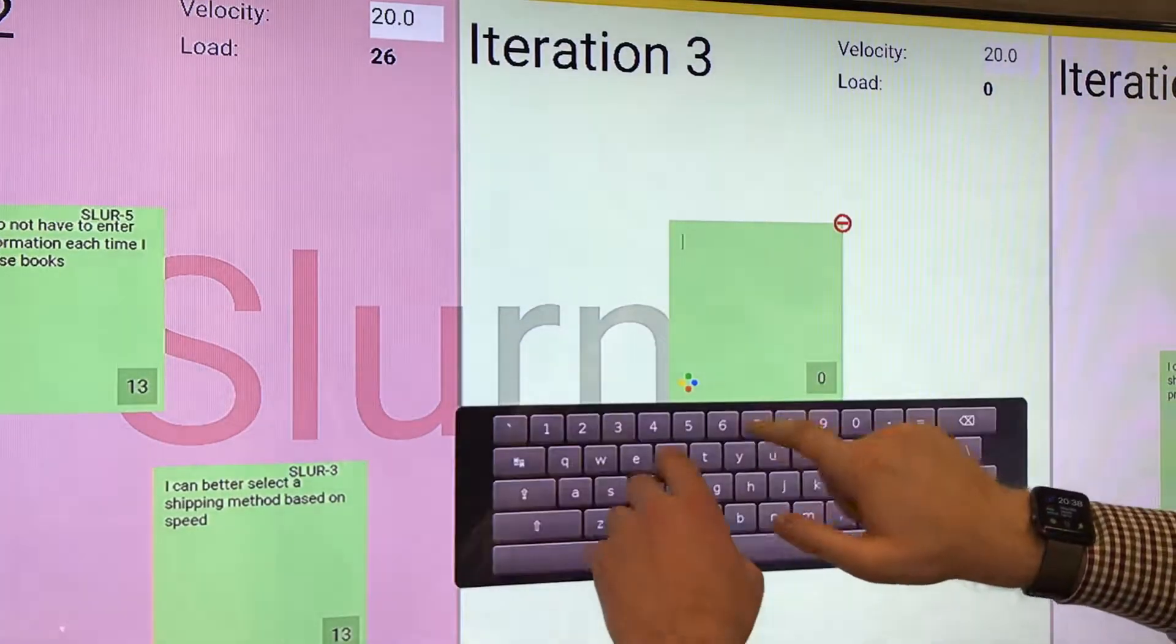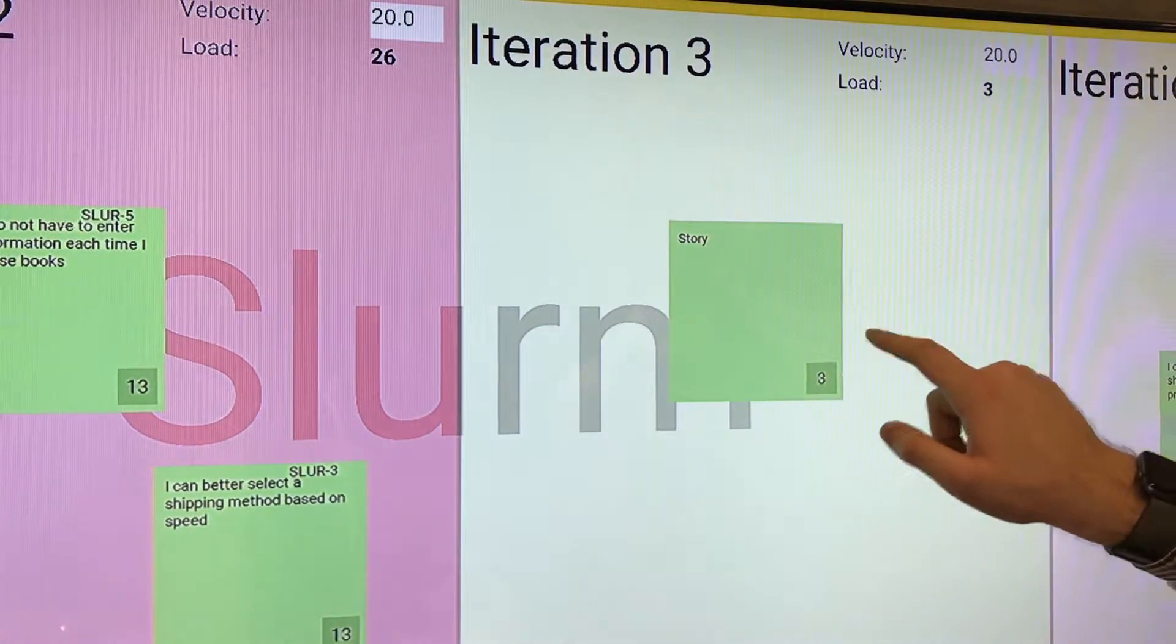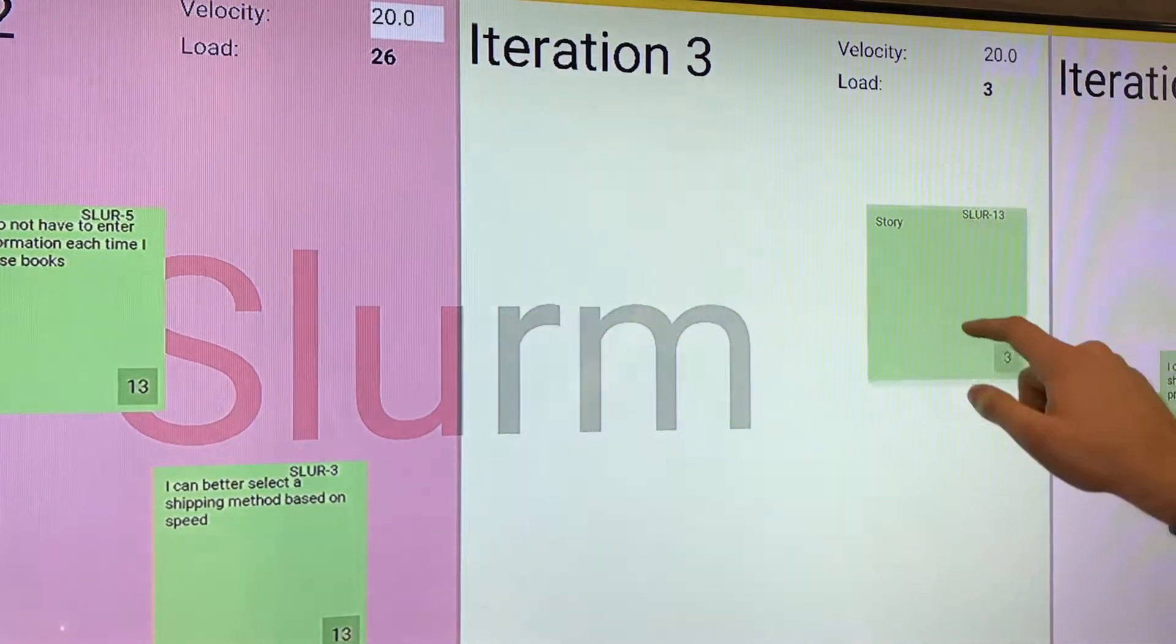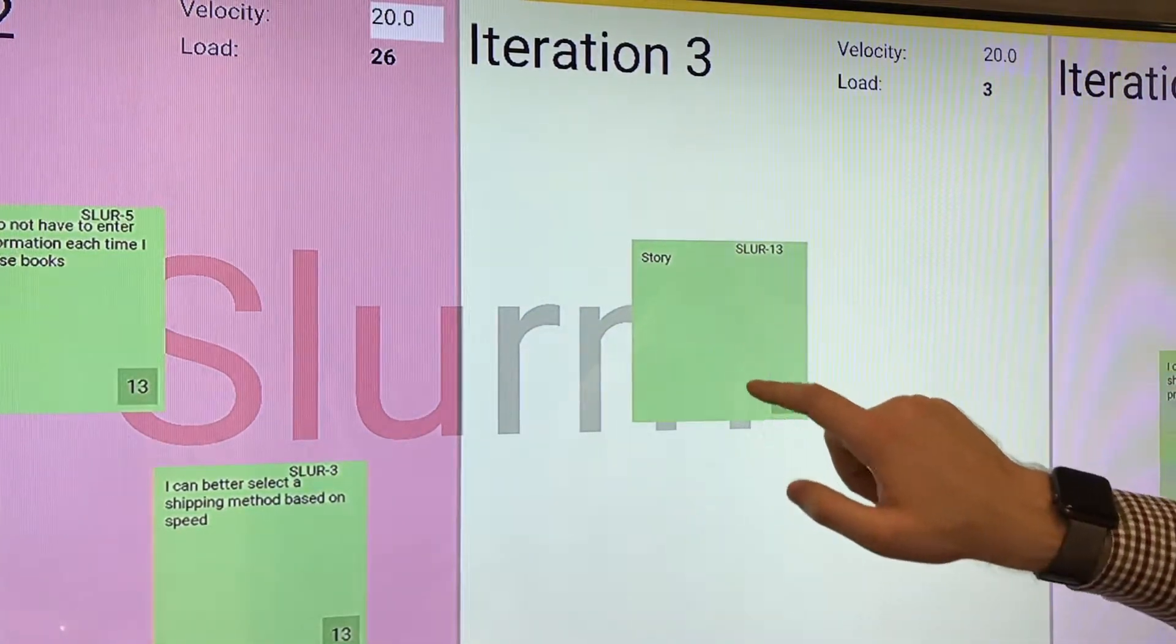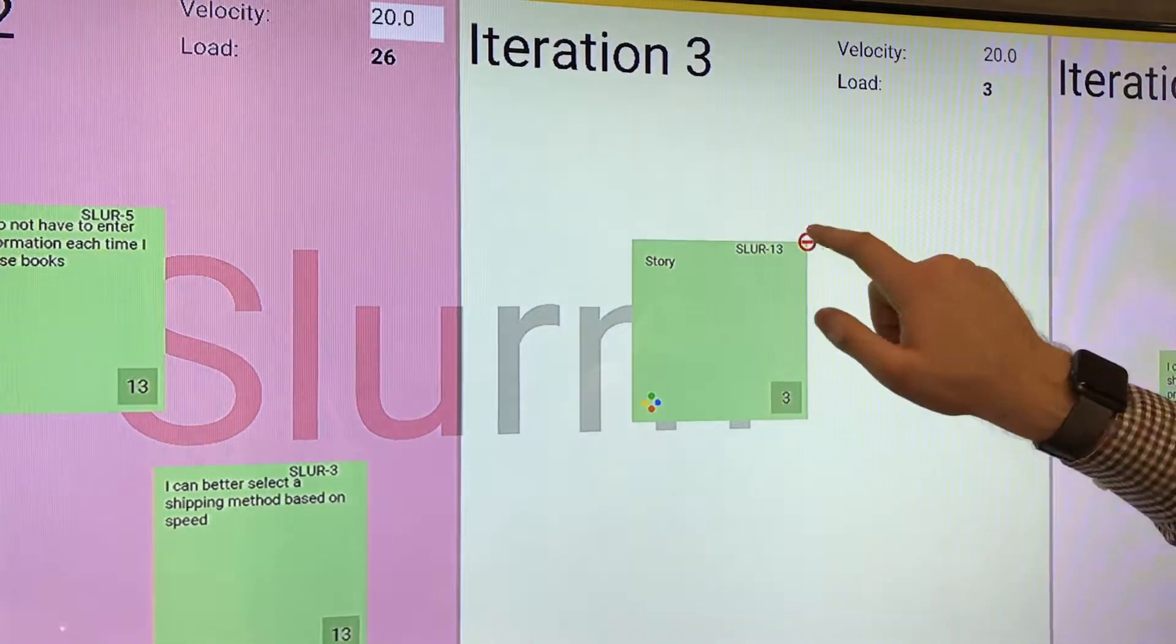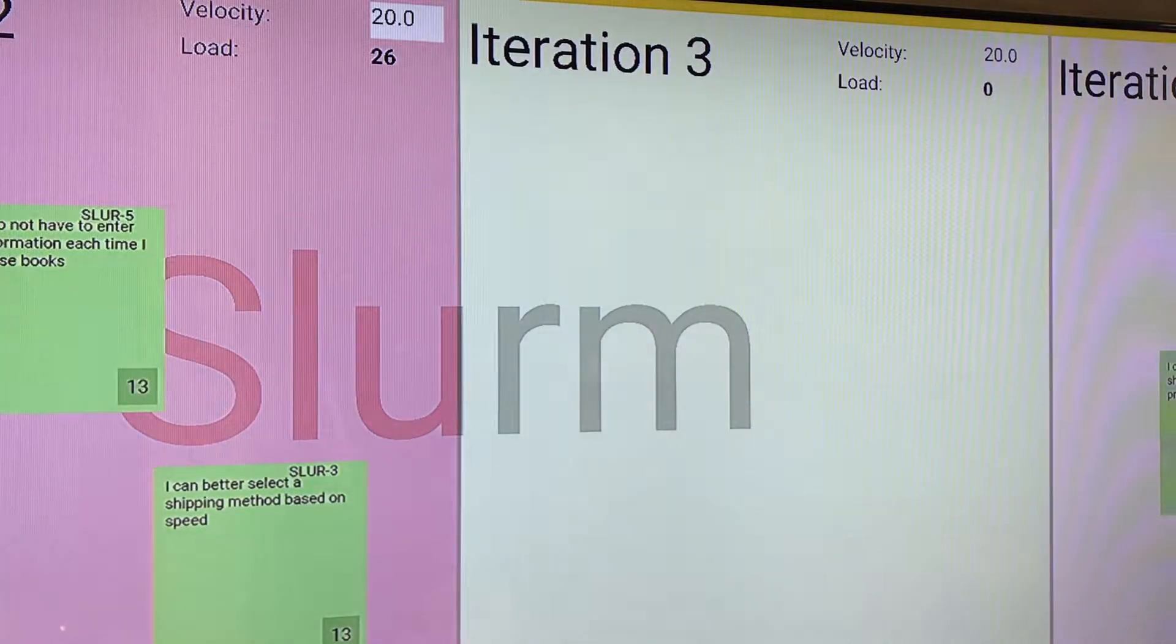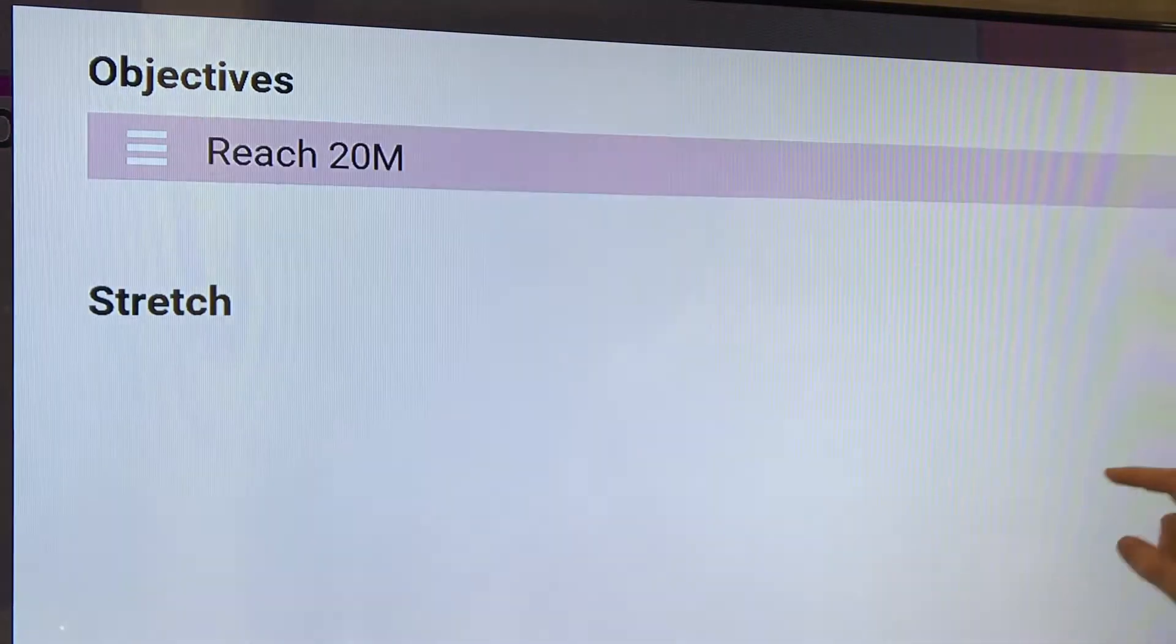Here we create user stories, type summaries, give story point estimations, drag the stories around, trash stories which don't deliver any value, and write down objectives.